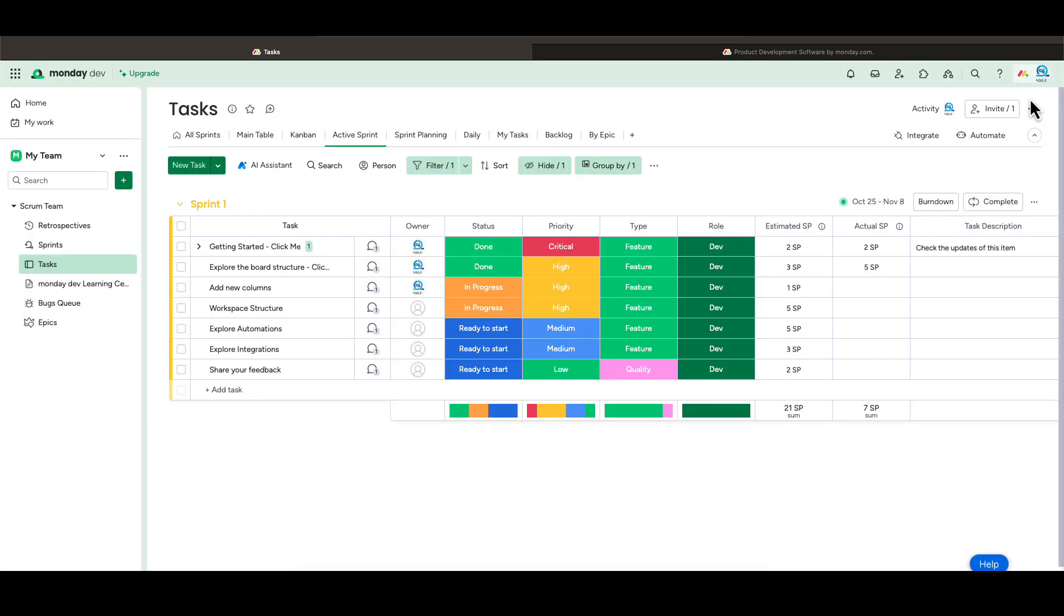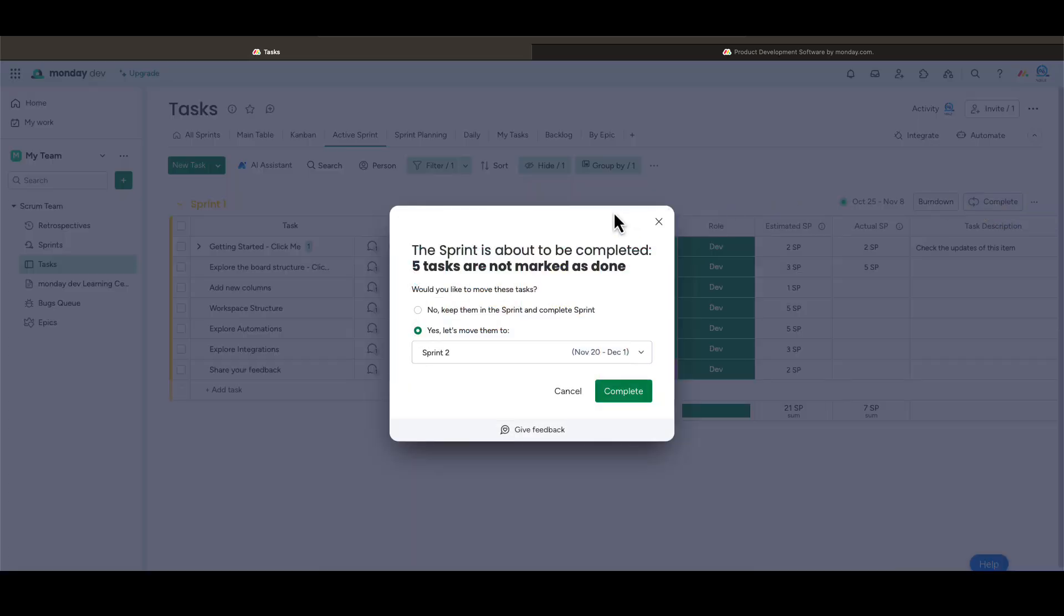Once the sprint is complete, you can click the complete button. If you have any tasks left over, you move them to the next sprint or backlog. Next, let's look at the sprint board.